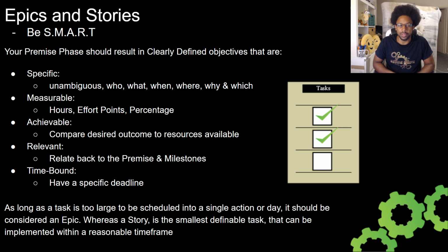If you have not got these components, then it's all well and good to say this is a specific action that will take this amount of time to complete, but you literally just can't do it. So make sure you spend time to actually break that down and say, all right, what are our resources? What is our team composition? What skills does our team have? If there's a skill we don't have, is someone capable of learning it? It's reasonable to say that your programmer might be able to learn how to implement 3D animated characters.